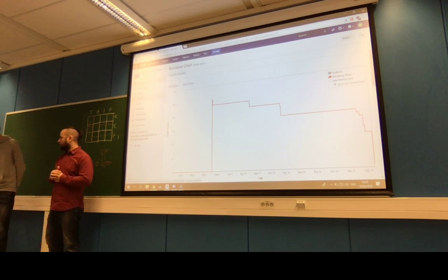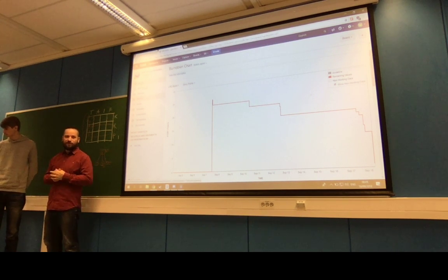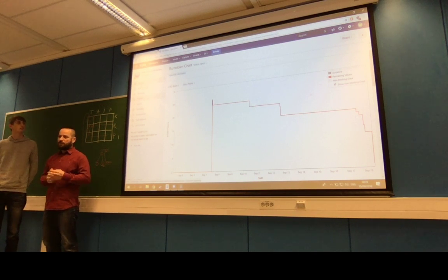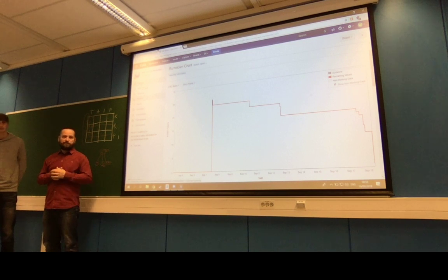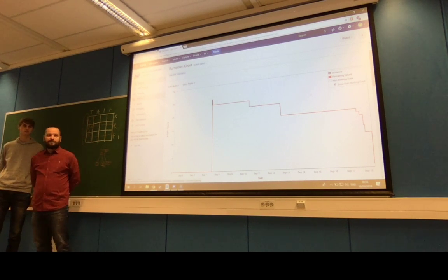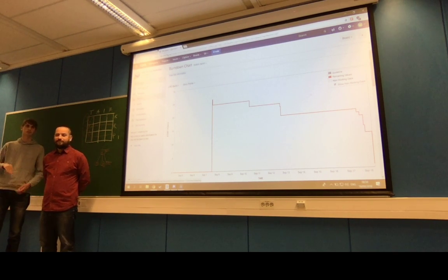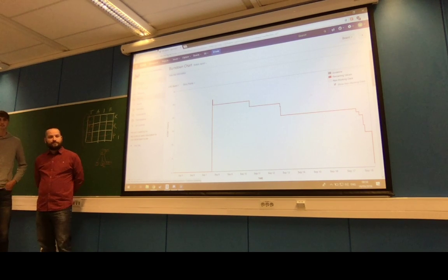It was a little bit unclear how it's going to end, how long it takes. So we have some multiple commits, like 2-3 subtasks that were pushed up together. That's also reflected in the estimation, because some of these big tasks were divided into subtasks, but we only gave story points to the big task. So we didn't actually reflect us doing subtasks, it's just doing everything. So more granular is probably better.